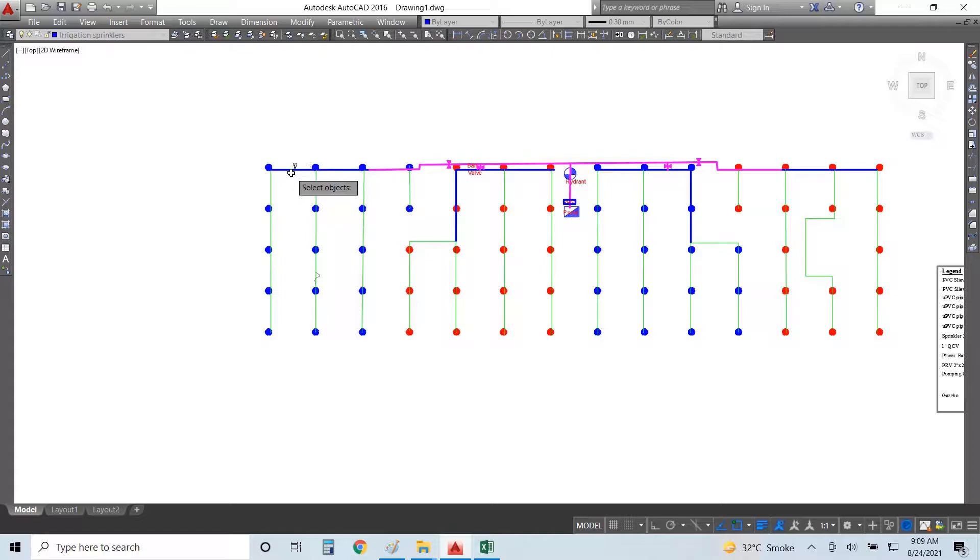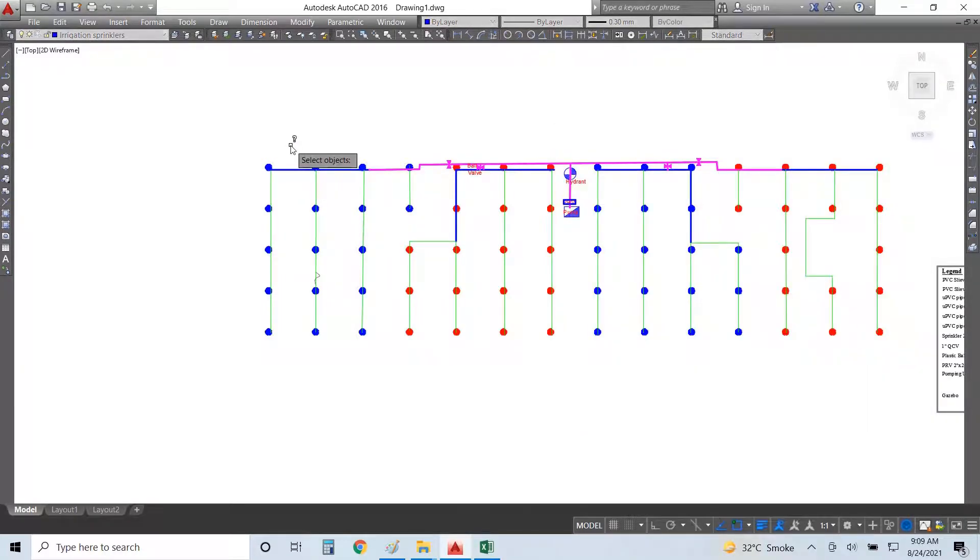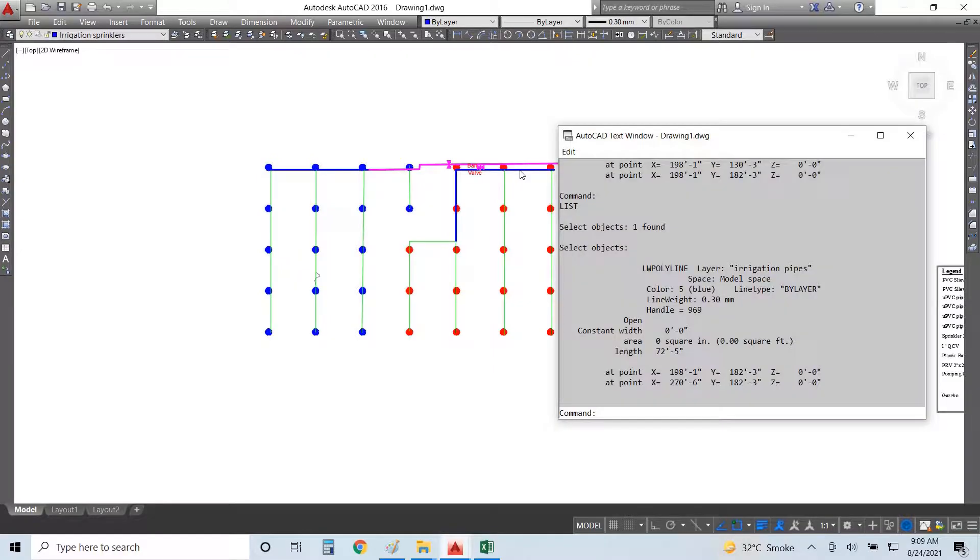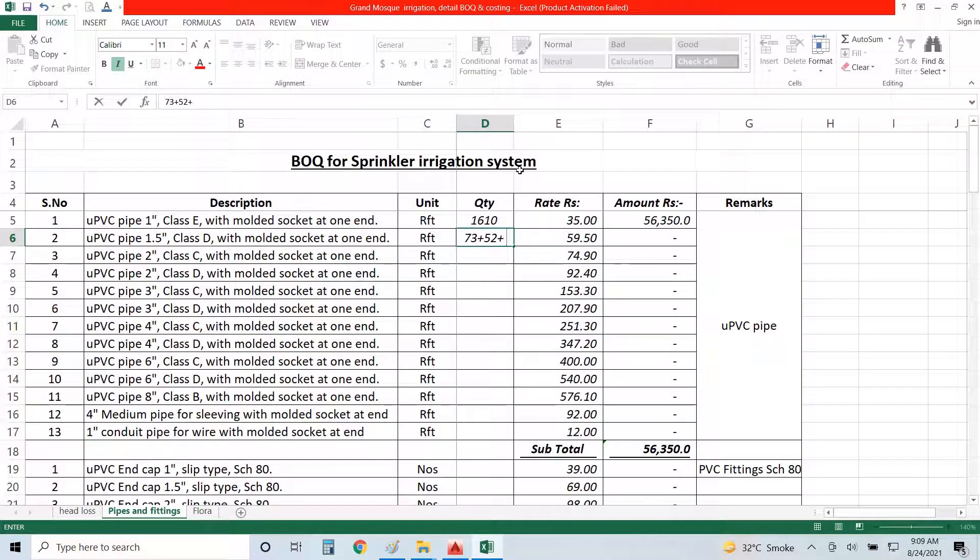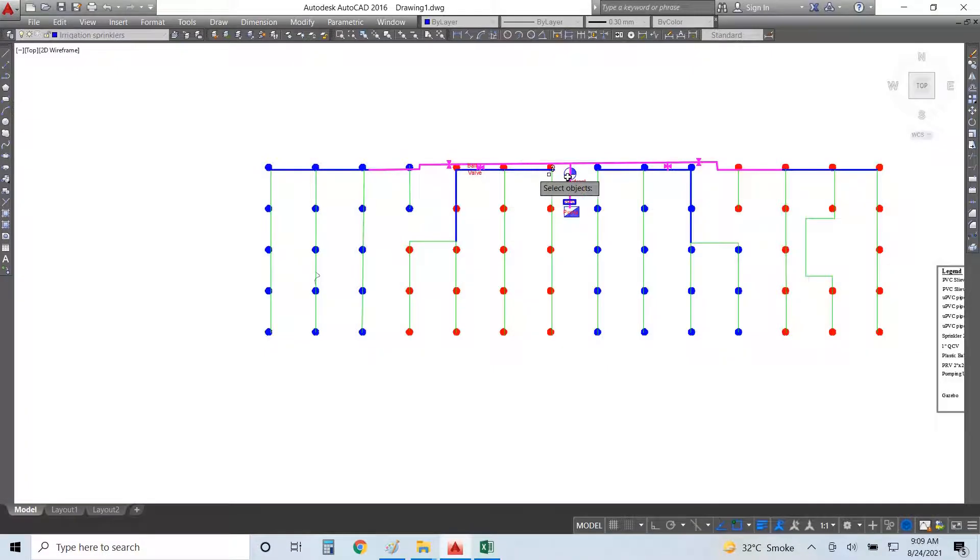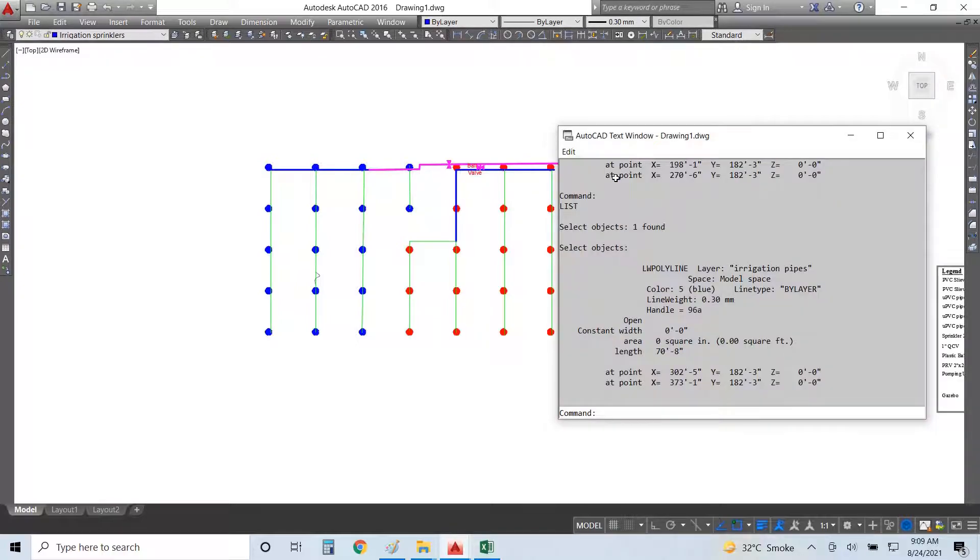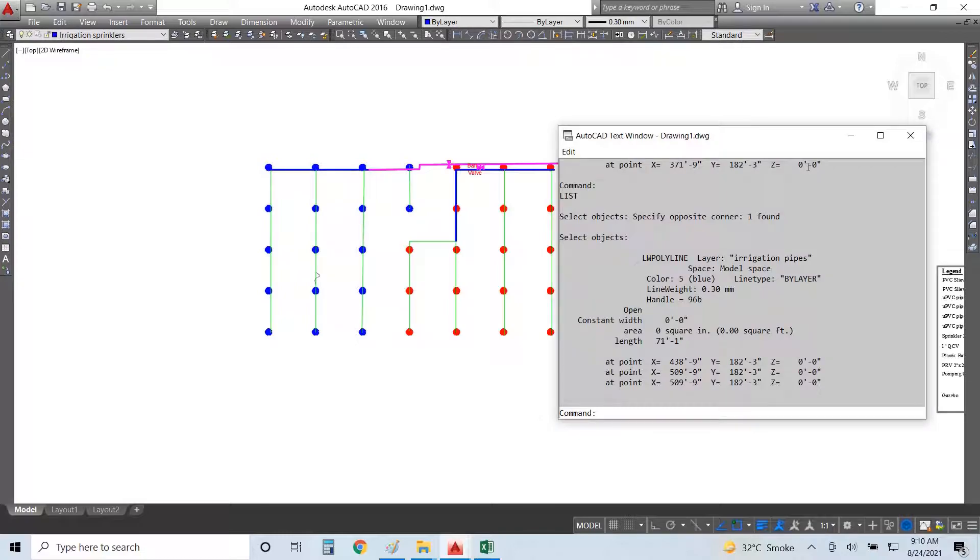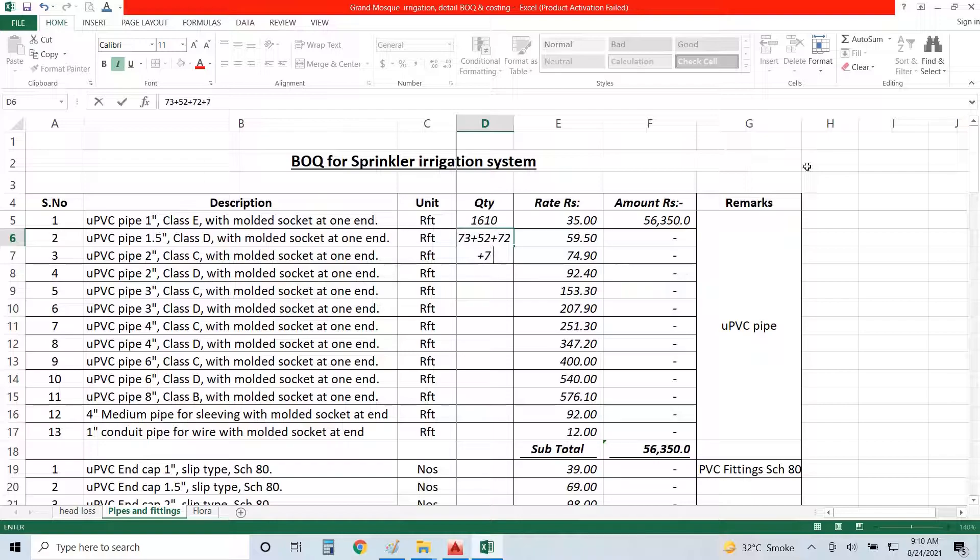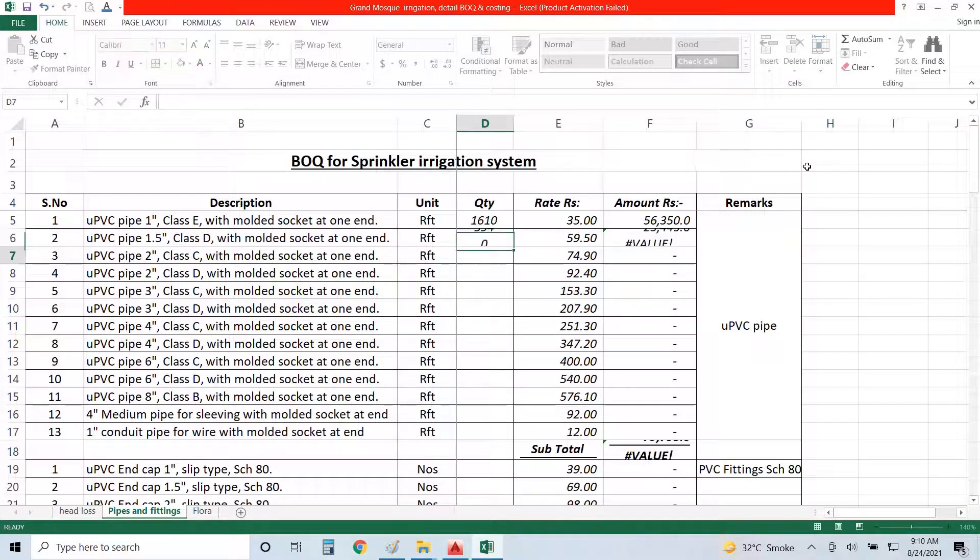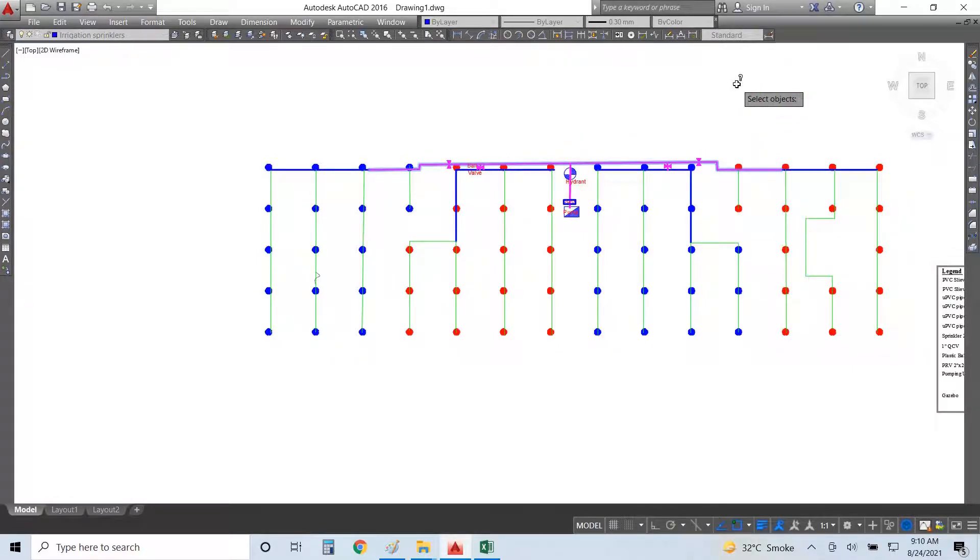Now 1.5-inch, that is 73 plus 52 plus 72. I have a line here, 73 plus 53 plus 71, then 73 plus 32. That is 345 feet line.